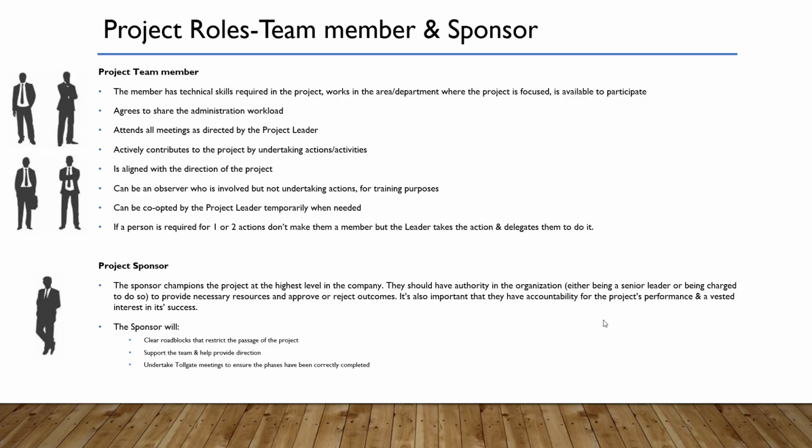Secondly, the role of the project team member is as follows, and just to highlight some key responsibilities: shares the workload, contributes to the activities, and is totally aligned with the project's direction. A team member can be temporarily co-opted to the project as required, but if they're not fully involved, then maybe they don't need to be a full-time member. So thirdly, the role of the sponsor is to provide necessary support as one who has the greatest interest in the outcome. They'll clear roadblocks and undertake tollgates or a phase gate step, providing approval for the project team to transition to the next phase.